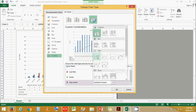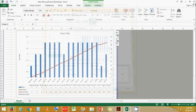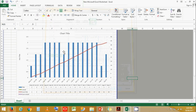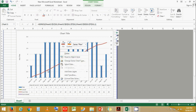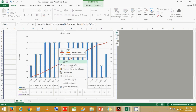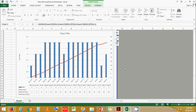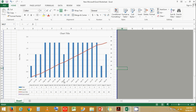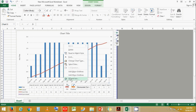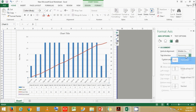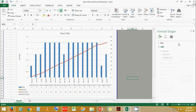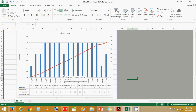Put the cumulative planned line on secondary axis, and cumulative actual as a line on secondary axis as well. Click OK. If you are using an older version of Excel, you would have to click on individual data series, right-click, and change chart type for each individual series. Now let's right-click and change the axis format. Let's change the orientation. That looks better. This axis represents the number of slabs for the histogram, and the secondary axis represents the cumulative number of slabs for the cumulative line graph.